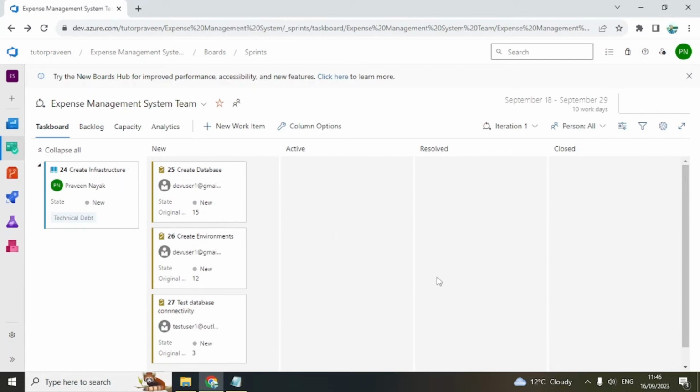So this is how you plan a sprint. Okay, so this is how you create stories. If you want, you can again split it. As I said, you can split these stories into multiple stories, and then you can have more tasks. So these are the things perhaps 2 developers and 1 tester will be able to do if this is the estimate. Suppose the estimate is too high and you think no, it cannot be delivered, so you split it into multiple stories and deliver only the things which you can deliver in that sprint.